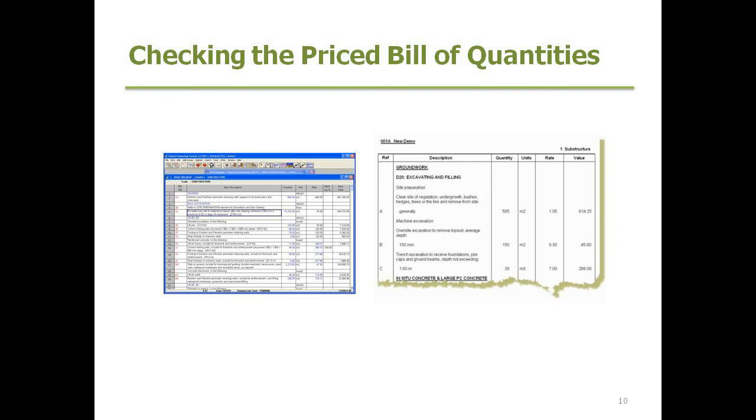So we want to ensure that everything is the same. Every contractor is priced the same thing, that they're looking at it in the same light, and that if there's any deficiencies in that documentation, it's clear that all of them have made that assumption or some haven't. And so it brings the price back to a common scope. It means that they've priced it at the same denominator, the same pricing denominator.